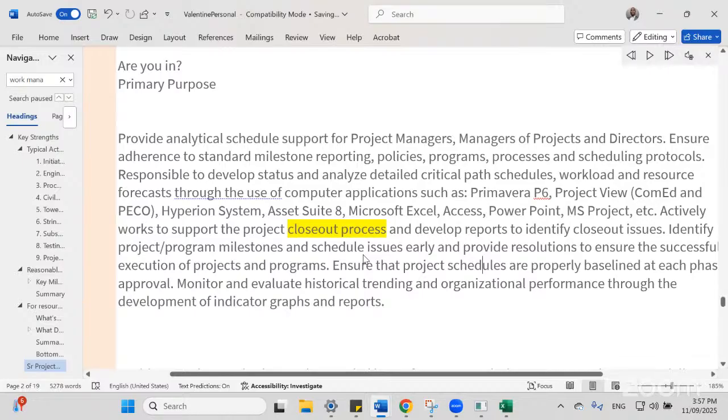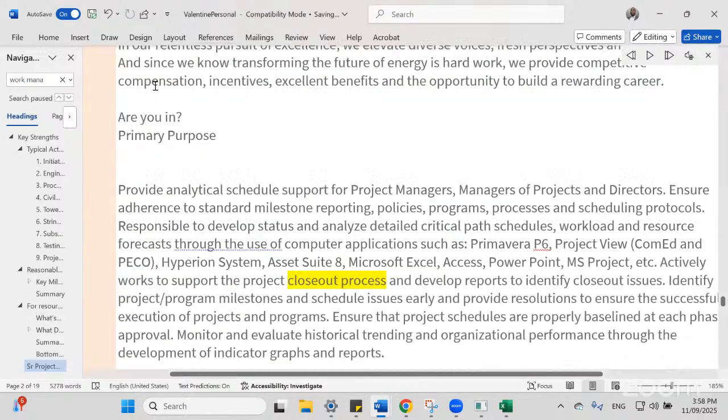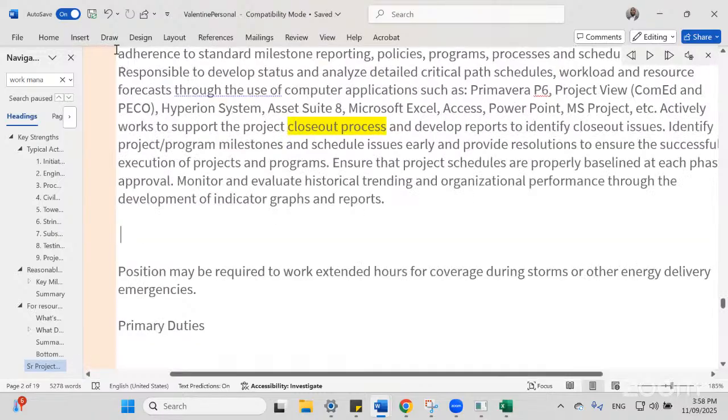After getting approval, we have to apply for building completion. After that, you have to go for snagging and de-snagging, means anything not done as per quality or if the client wants some change, we have to do rectification in the closeout process.